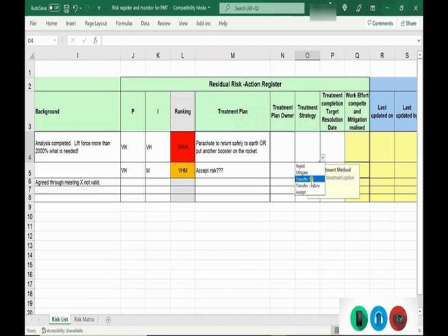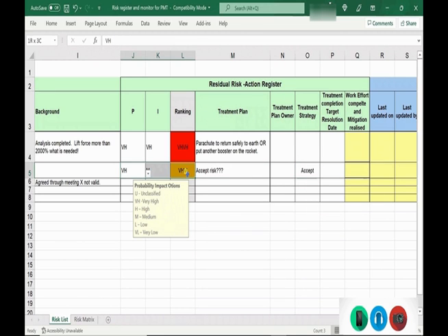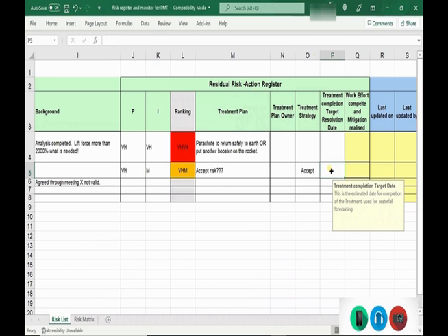So let's say in this example there is a risk register for the rockets themselves being capable of thrust, and this is the risk against the top level overall, big deliverables. You may transfer the risk onto that register and say, actually, you're looking after the rocket, you do it. Accept means we've accepted the risk. So this one means that actually we're not going to do anything. It's going to stay as that. We accept that if it happens, it happens. We accept the consequences of it if it's realised.